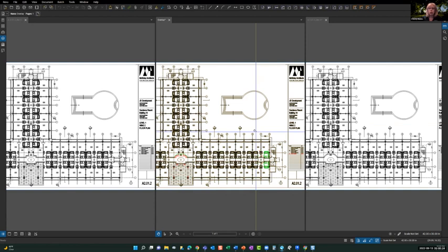If you had to do a narrative on how you're going to coordinate work, another place this would be very effective is if you overlaid multiple stages of your logistics plan. Maybe you've got your trailers coming out on site, and then you do all your concrete work, then your roofing, then your interiors, and you could pull off those layers if you did multiple site logistics plans. So I'm just going to throw that out there.